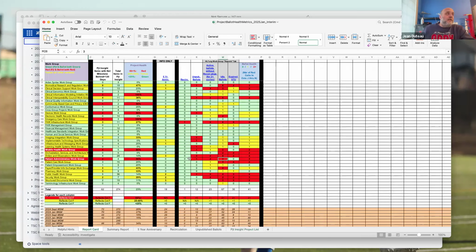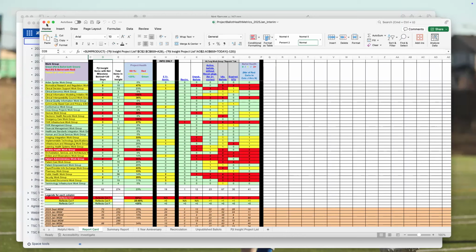You can reach out to Anne or anyone on the TSC if you don't understand whether it's yellow or red. Very often with Project Insight, it's going back to Lynn and or Dave Hamill to help update the information. In this case, in Project Insight, we said we were going to ballot in January 2023 and it's January 2025 and we haven't done that, so we missed the milestone date. We just need to update our dates. Okay, thank you. Yep.